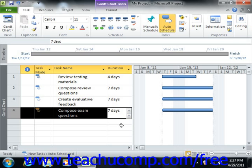To enter an elapsed time duration for a task, you simply enter the abbreviation E before the time abbreviation used.